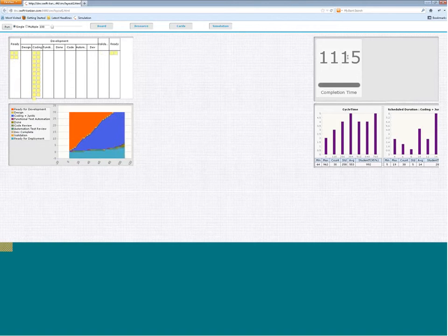And let's see, coding is still taking a bulk of time at this point of time. But now you see that work is not piling up as much. However, you do see a small bottleneck happening in the coding done lane here, which means that the test automation review, the guys who are supposed to pull work from this done lane, are getting choked.